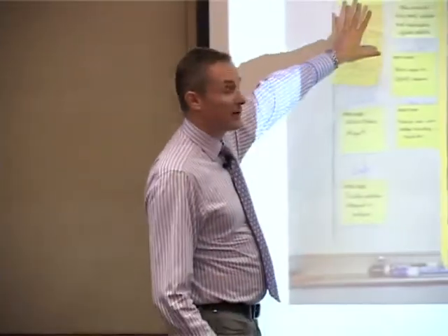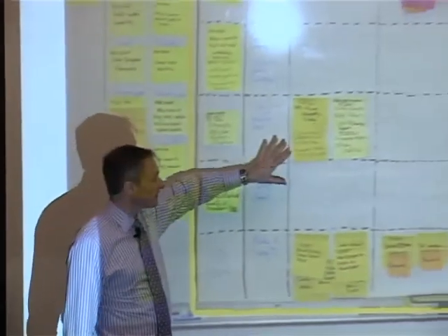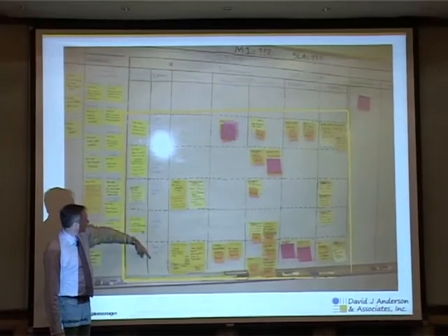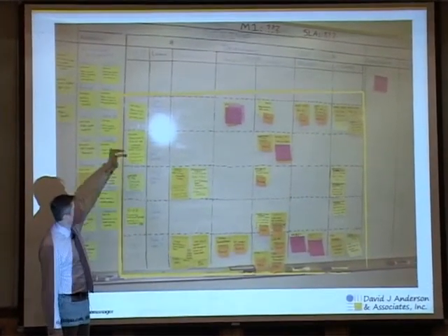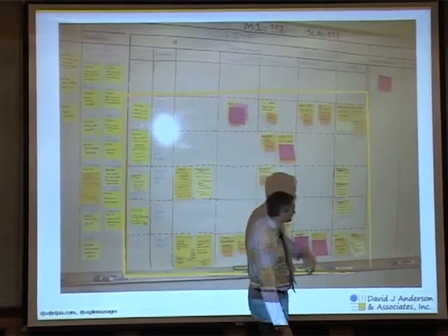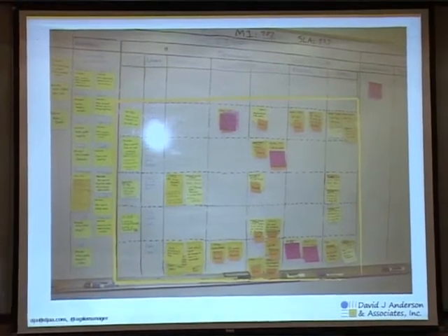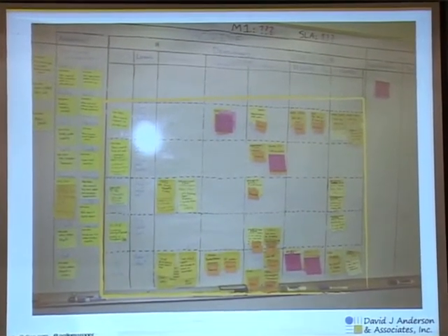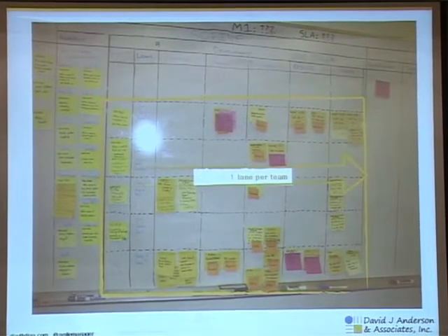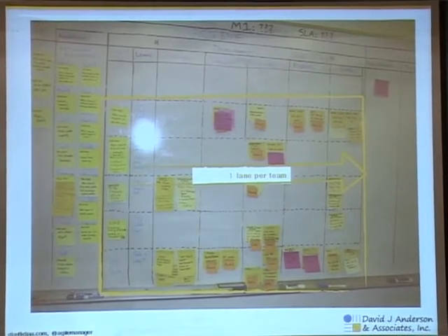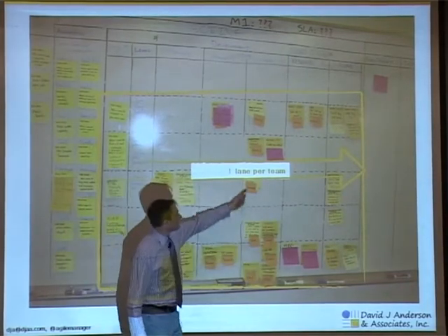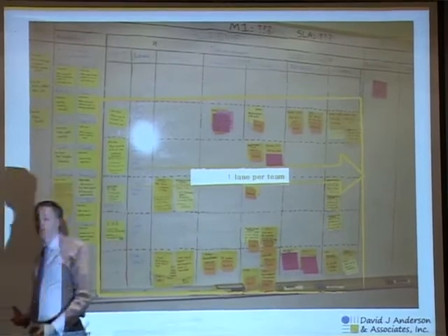these are large requirements, and then they're being broken down into these yellow tickets, which are user stories. And we have 5 teams. The team member names are written in here for each of these larger requirements. User stories are going to flow across here. And this was a photograph taken very early in the project. It really wasn't fully bootstrapped at that point. Wasn't fully staffed, but we've got one team per lane. You see the fixed team member names here, and then the other team members are represented by these orange tickets with the names of the people written on them.